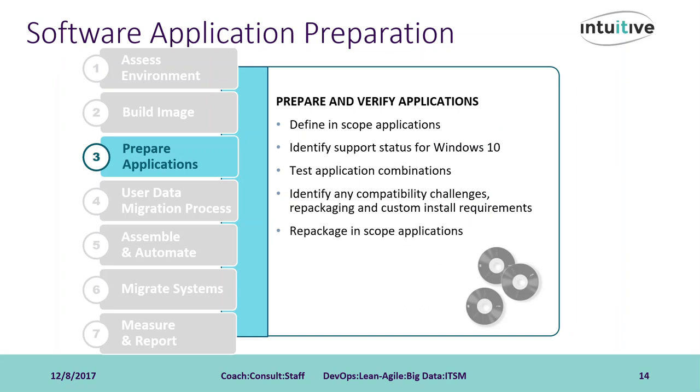Aggregating that data and having it be part of your meetings with the various lines of business to discuss their core applications and how they relate to the migration will be key to the overall project success. Again, these reports will also help you boil off all of the unused and unneeded software that will also save both effort to integrate and money on license renewals.